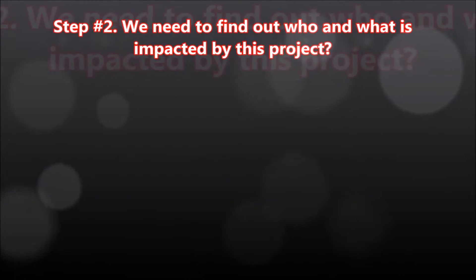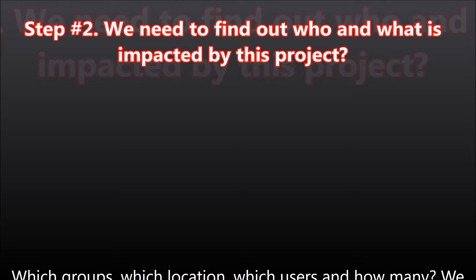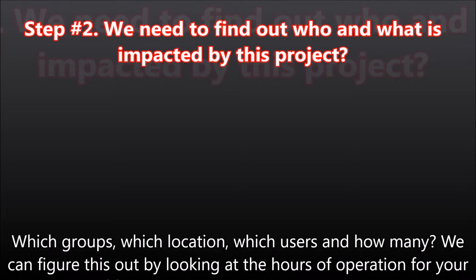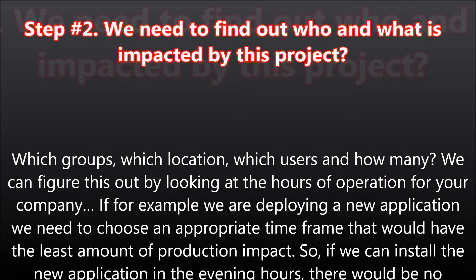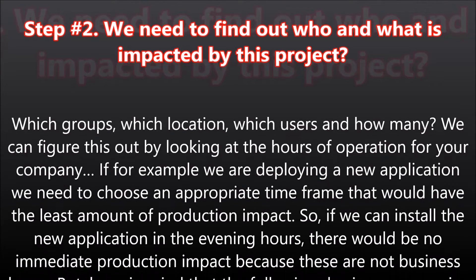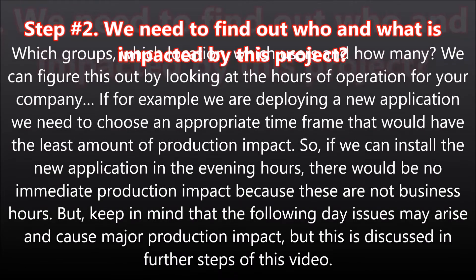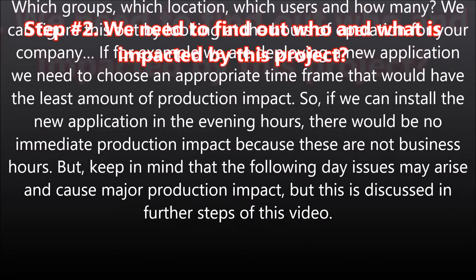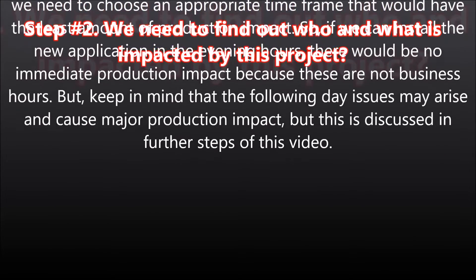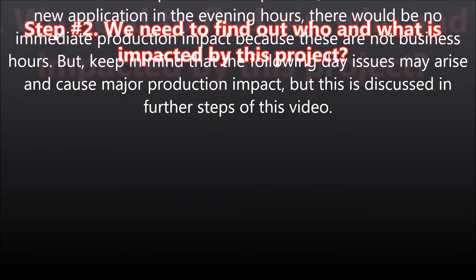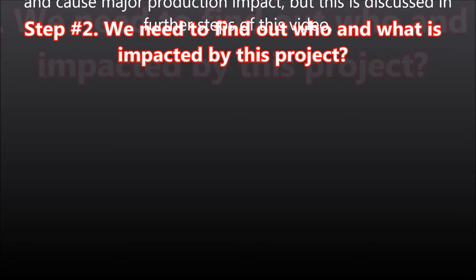Step number two: we need to find out who and what is impacted by this project. Which groups? Which location? Which users and how many? We can figure this out by looking at the hours of operation for your company. If, for example, we are deploying a new application, we need to choose an appropriate time frame that would have the least amount of production impact. Installing in the evening hours means no immediate production impact, since these are not business hours. Keep in mind that the following day, issues may arise and cause major production impact, but this is discussed in further steps.